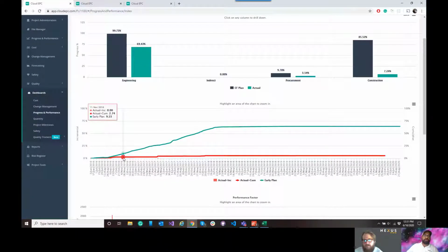If we don't spread all of the budgets out over time, the system from a plan perspective will not hit 100%. So this is telling me it still has some work to do in terms of spreading our hours over time. The earned value is based on when we physically pick that week and update the earned value for what week we're updating. You'll see that there's a slight increase right here because of the updates I had just done for the week of June 12th.